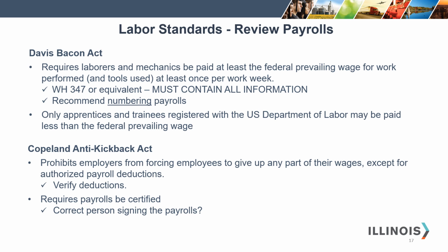If you're using an equivalent payroll to the WH 347, the certification must have the exact language that's on the WH 347, and you must verify that the correct person is signing the payrolls.